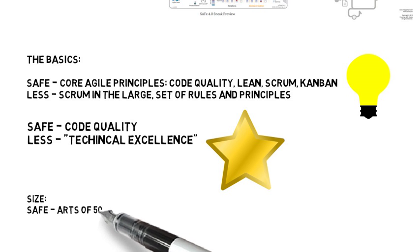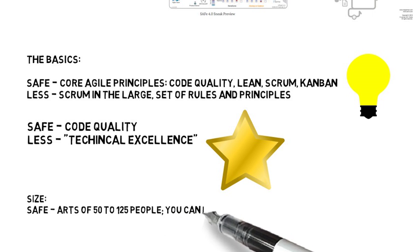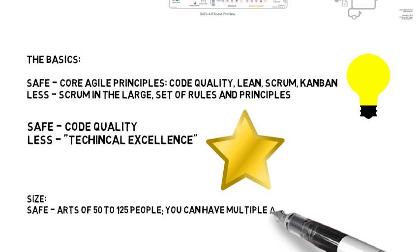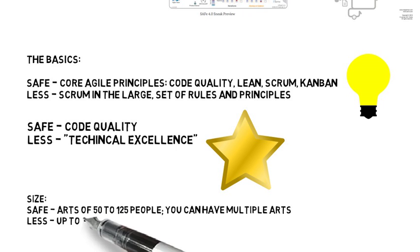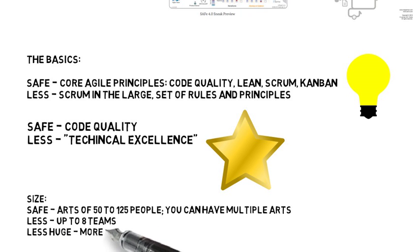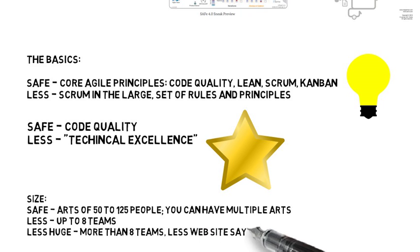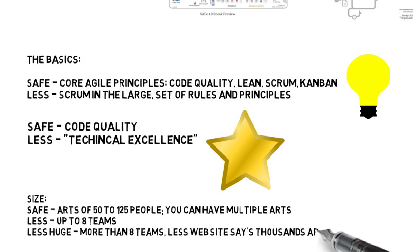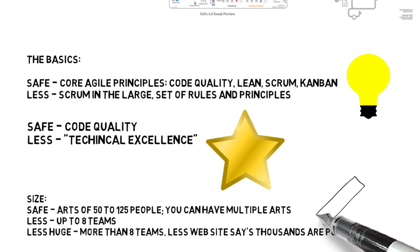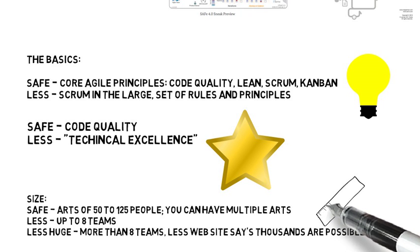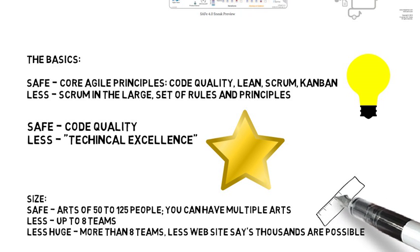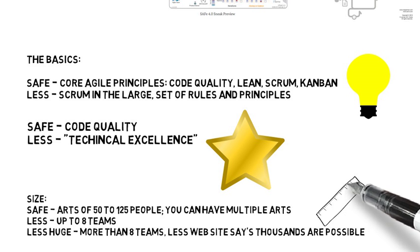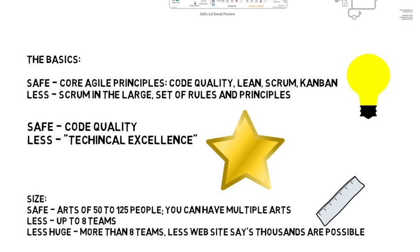And then the size. So SAFe has what we call ARTs, Agile Release Trains of 50 to 125 people. And you can have multiple ARTs or Agile Release Trains. LeSS, regular framework, up to eight teams. And LeSS Huge, more than eight teams. And they say actually on the LeSS.works website that it actually goes up to thousands of people. I do not have experience seeing that in practice, but that is what is stated on the LeSS website at this point. So that's scale. So you have the ability to bring both of these up to a very large scale.